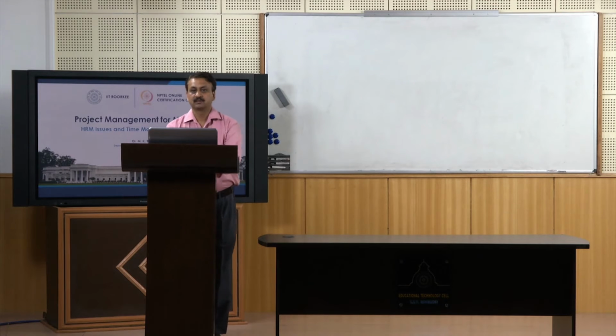Control. Sometimes not taking a decision is also a decision. In other words, you should give them a cool down period. If two members are fighting with each other, or if there are some conflicts between two members, then you just let it go for some time. It is possible that they themselves resolve those conflicts, and it works in several situations, right. But it is not a good method, right. The best method is to look at the root cause of the conflict and sort it out, right.